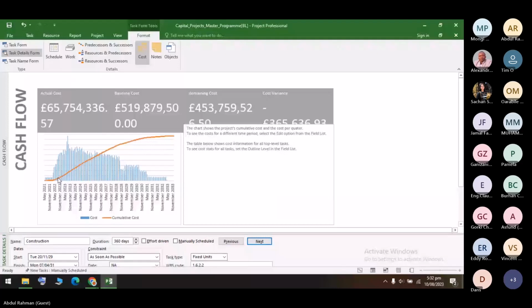And then the second phase, which Mr. Abdurrahman was telling you guys about, is the rapid growth phase. It is the phase in which the crux of the construction process will occur. As the project advances, activities are executed more efficiently and the progress accelerates. This is the most important phase for the planning engineer or the construction manager, because this is where the whole construction activities will occur. This phase is characterized by a steeper slope on the curve as construction work intensifies and milestones are achieved.